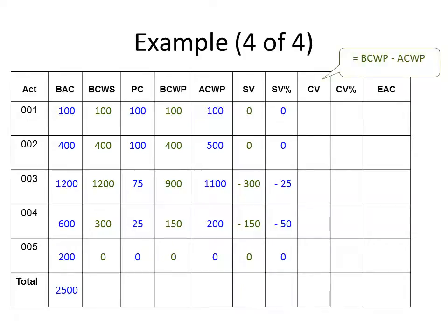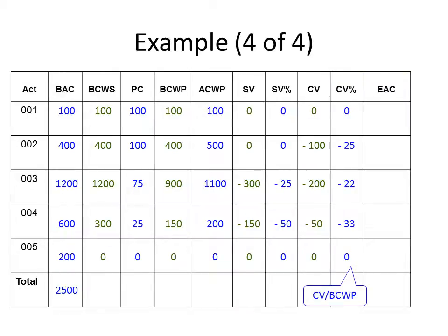Next we calculate cost variance using the formula: budgeted cost of work performed minus actual cost of work performed. For activity two, BCWP was $400,000 but ACWP was $500,000, resulting in a cost variance of minus $100,000. Activity two achieved its time target but was 25% over budget. Activity three is estimated to be 22% over budget, and activity four is 33% over budget.